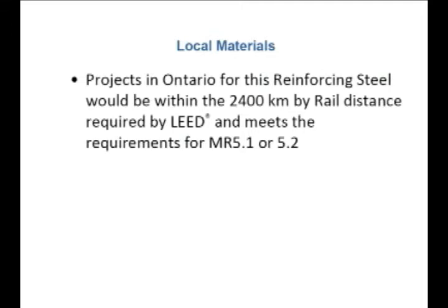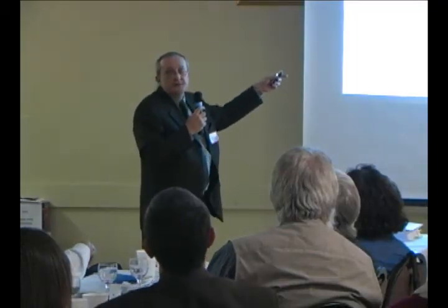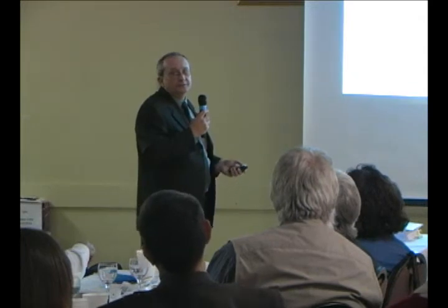For that particular one, projects in Ontario for the reinforcing steel would be within the 240 kilometers that's required by LEED for a rail distance. So any project in Ontario, if using that rebar, could count.